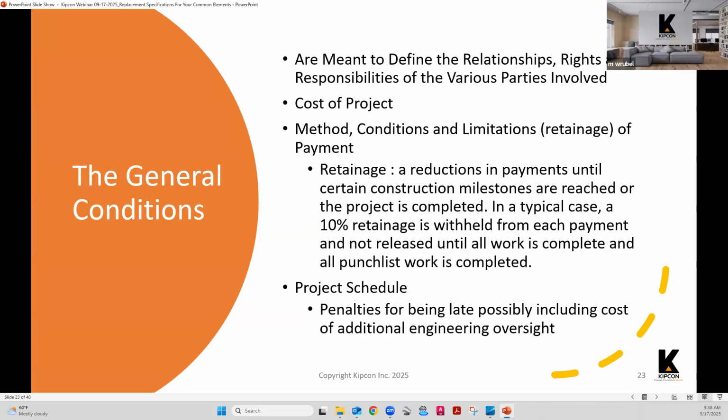Sometimes there will be a project schedule included. Oftentimes that is weather dependent. If it's something exterior, like pavement or roofing, the contractor will provide a schedule for that work. But if you are getting 2 months of rain like we did in the early part of this year, that is subject to change.